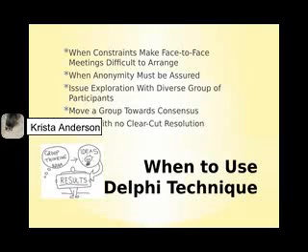While the Delphi technique has broad utility due to the use of the skills and insights of experts, there are scenarios in which it is more appropriate. One such scenario includes projects where cost and schedule constraints make it difficult to facilitate face-to-face meetings. Gathering information from participants remotely ensures that the project cost and schedule do not inhibit progress.